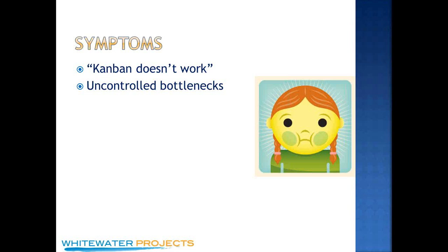WIP limits are how we control bottlenecks. Maybe it's in testing — your developers are just developing, developing, developing, and then dump a bunch of stuff on your testers. That is an uncontrolled bottleneck. There's this huge pile in front of the testers and they can't work their way through it fast enough to keep up. People get frustrated. Developers are working their tails off to deliver features, but it's not getting tested. And then someone says, okay, we'll just skip testing. No! That's the symptom of not having a WIP limit — you don't have controls.